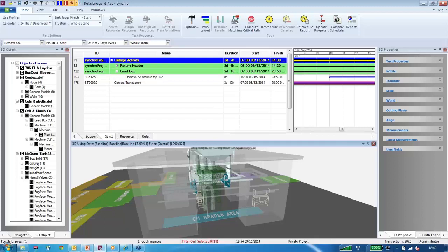The type of refinements we were doing was generally one-way. We'd review the model, make changes in P6, and send it, but that was more due to my comfort level at the time with Synchro, the scheduling tool, and the fact that we weren't using the API, but we were using the XER import-export. But I would certainly recommend that, again, with that it depends clause based on the project, your team, and what you're doing.